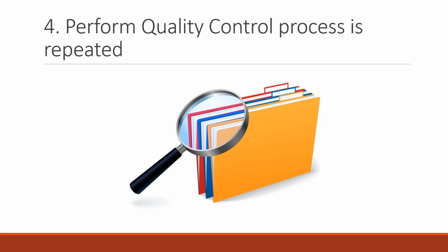Again, there are three possible outcomes here. Although not much of a concern now, because you have already worked, right? The coders, they've already worked. So the first possible outcome is that the code passes, no defects found, no change requests required. The second is again defects, and the third is again change request. So you will go back to step three if there are any defects or change requests. But if the outcome is the first case, where the code is absolutely good to go, you're done with step 4 and you will move to step 5.